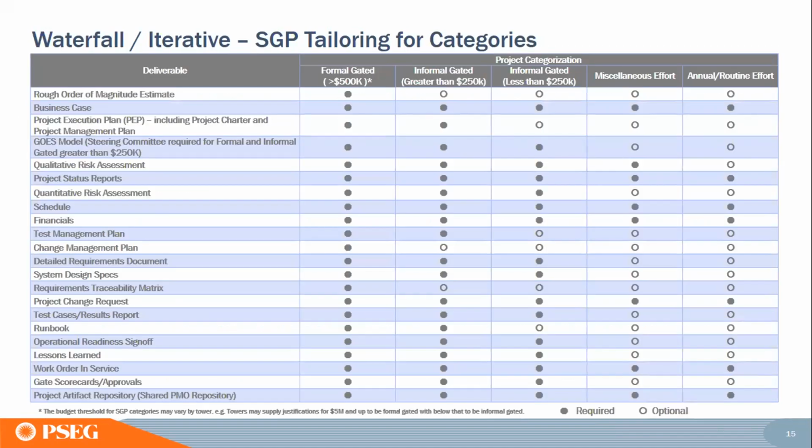As a project manager, these are the 3 steps that you should do, and you should be good with your project, in my sincere opinion. First, identify what your project is by categorization. Second, identify what methodology you want to adopt. Third, what tailoring you are going to adopt for the project. And record these things, okay? Document this tailoring matrix, submit to your group product manager and to your director, get their approval and buy-in, then you are good. This becomes your baseline for the life of the project. Anywhere when you are discussing or reviewing or interacting with the other teams, this becomes your fundamental document. Got it?